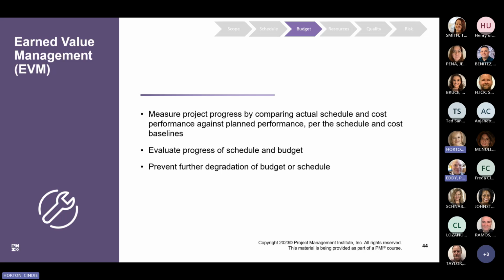The EVM method involves first assessing the value of work by determining what work has been completed and the value it has contributed to the project. These performance reviews are usually included in project status review meetings. Then, during planning, project work is broken down into work packages and activities. Each work package is assigned a budget and a schedule.